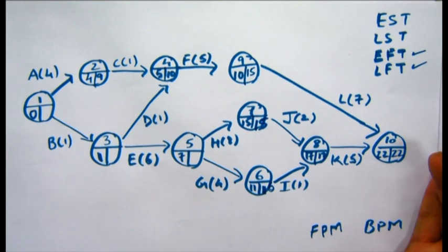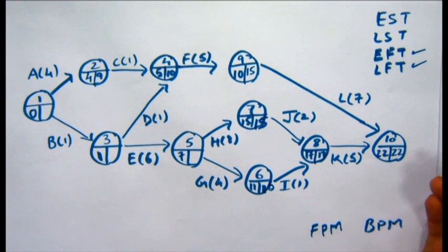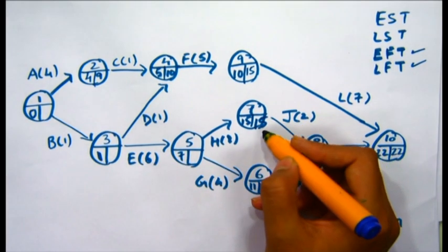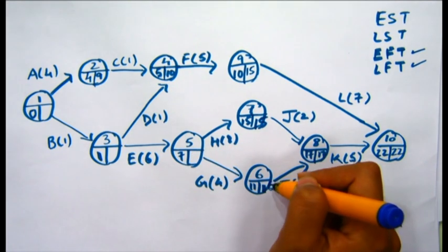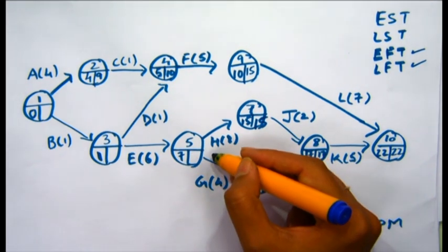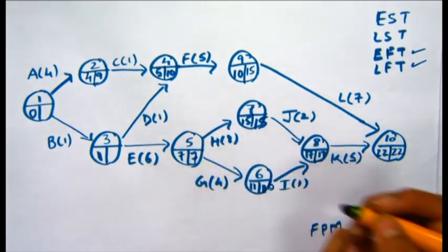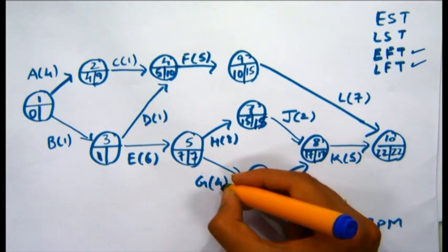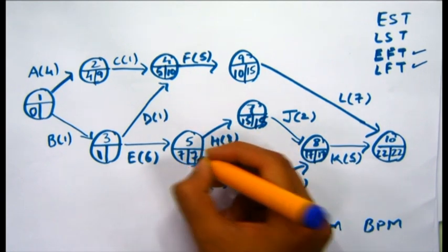By theory, it states that when you have the merge of events, when we are adopting the backward path method, we only put the time which is the lowest. So from this data we have 15 minus 8, 7. From here we have 10 minus 4, 6. So we write here 7. This is 16 minus 4, which would be 12. Here we have 7, so we select the lowest time, which is 7.